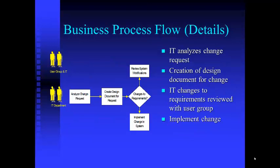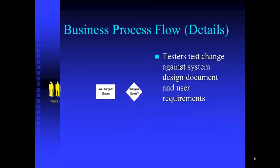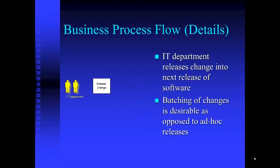After the user group and IT group look at it, assuming it's accepted, it gets passed to IT. IT analyzes the change request and creates a design document. Changes to the requirements are reviewed with the user group, and IT implements the change. Testers then test the change against the system design document and user requirements. If the change is correct, it's sent to the IT department who releases the change into the next software release.